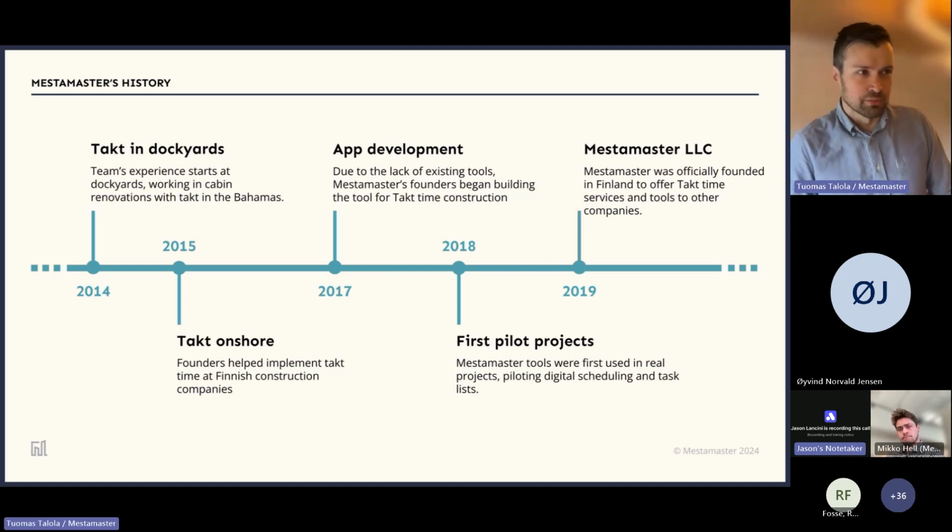Probably some of you already guessed the key answer here is takt. And by takt, it means that the takt length has to be really small. It was 15 minutes. So as you can imagine, in 15 minutes, you cannot complete really complicated tasks, and the flow must be really efficient.